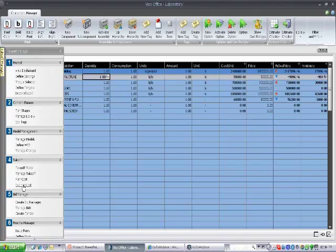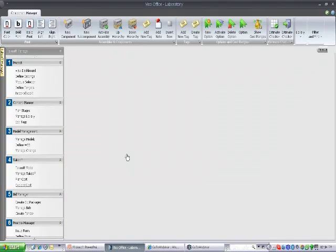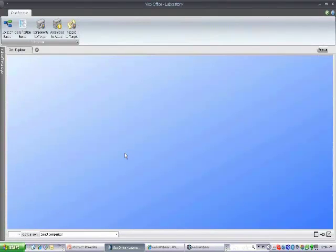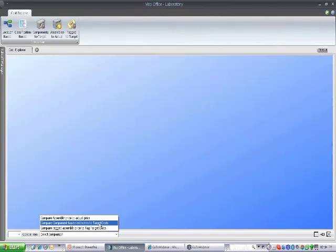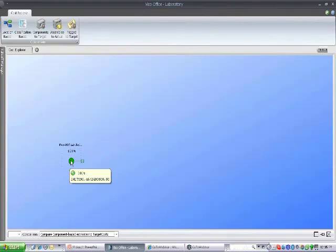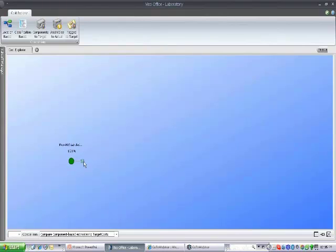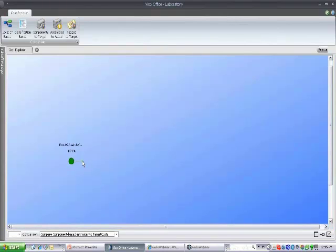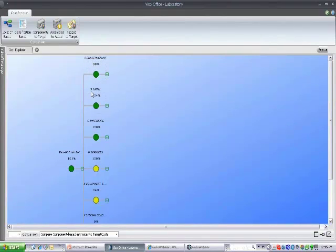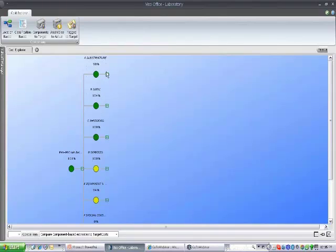By using Cost Explorer, as I mentioned earlier, you'll be able to break down your budget using these visual clues. So here you've got the budget itself for the building and when I click on the plus sign, I can see the different headings for my budget. In this case, the substructure, the shell, interiors, services, etc.